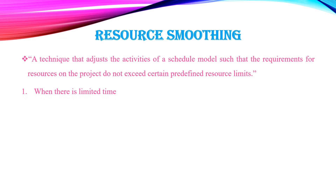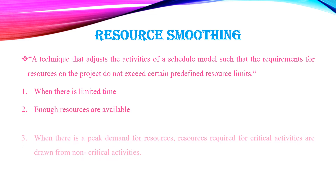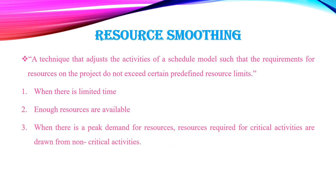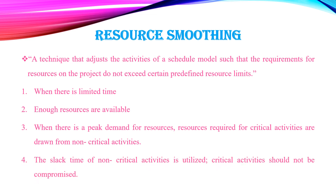Resource smoothing is adopted when there is limited time but enough resources are available. When there is a peak demand for resources, resources required for critical activities are drawn from non-critical activities. The slack time of non-critical activities is utilized, and critical activities should not be compromised.